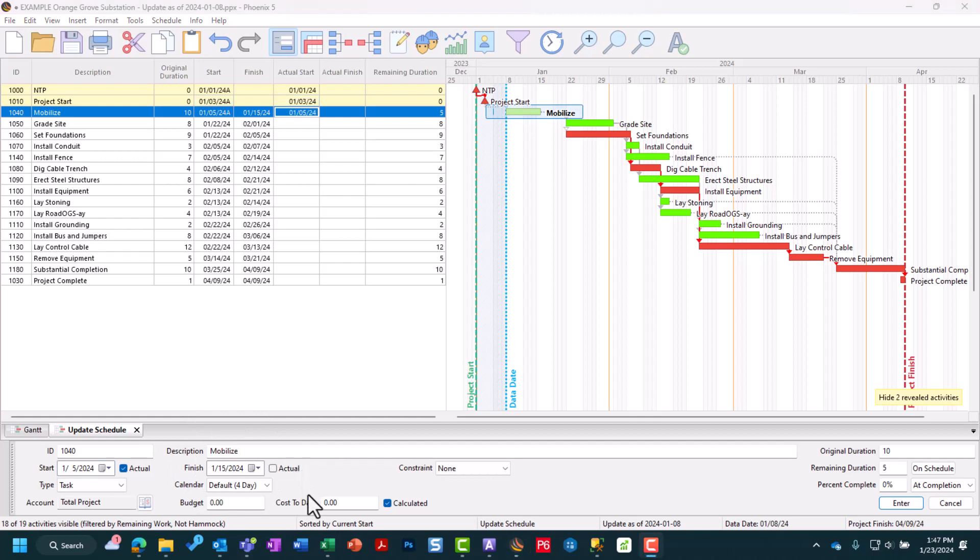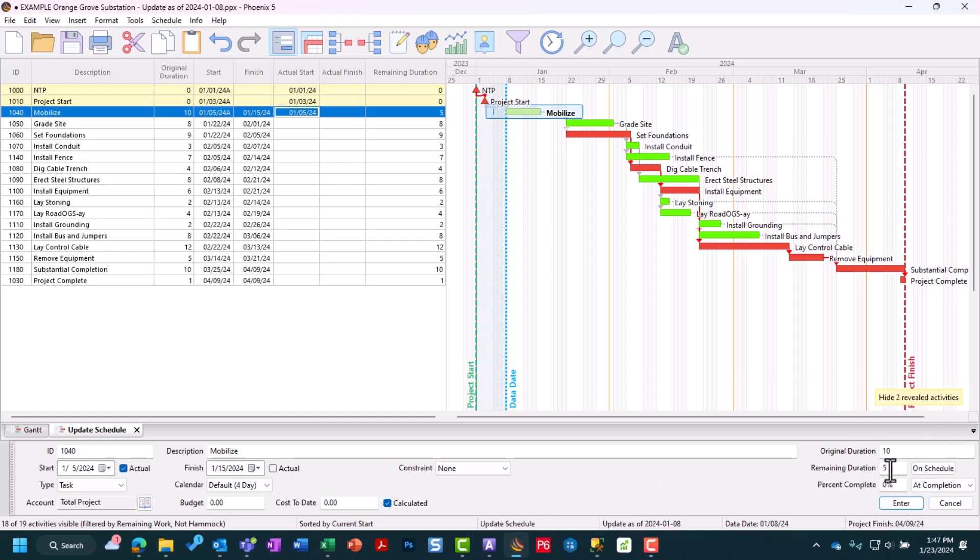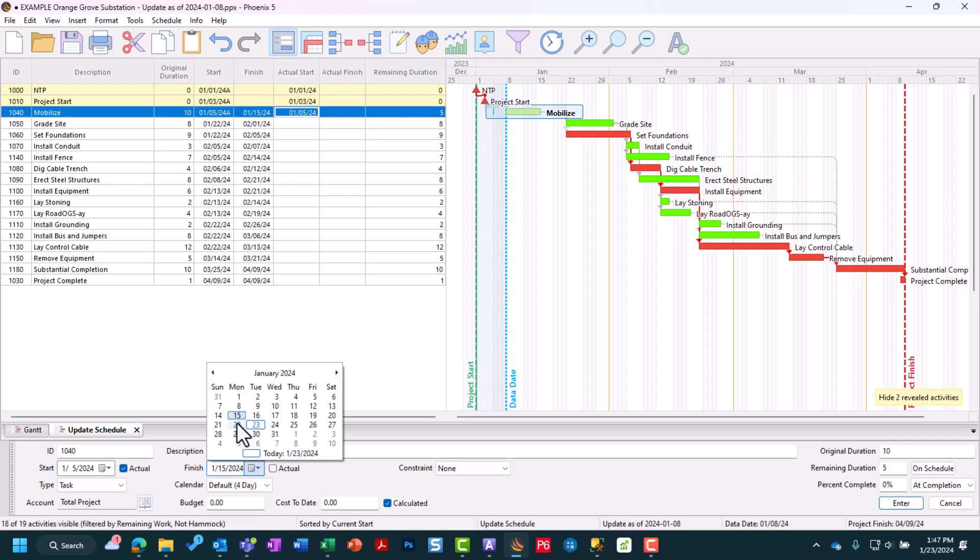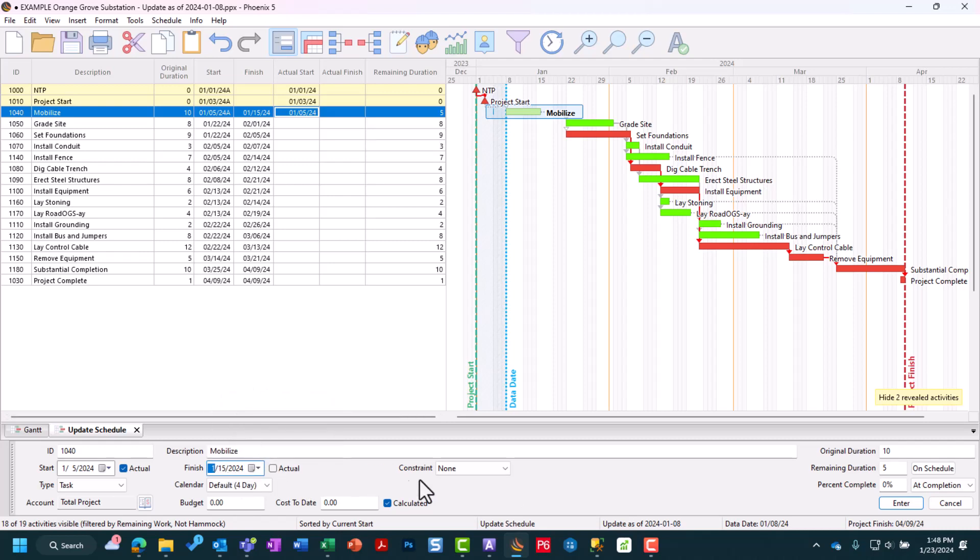If there's remaining work, there are three ways to calculate that in our Phoenix schedule. First is plugging in the actual remaining days, if you know that. You can also enter your percent complete. CDP has a video on that as well. The third way is by plugging in a finish date. If I plug in a finish date of January 15th, you'll notice it automatically adjusts my remaining duration to 5 days. You can see how these three are all linked.